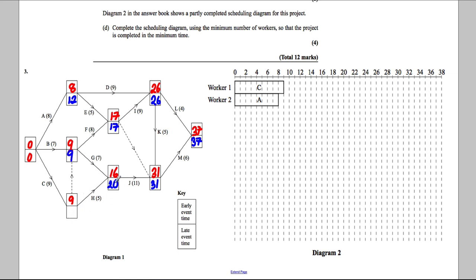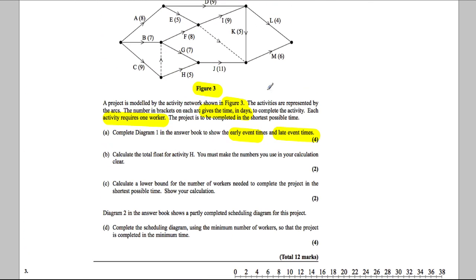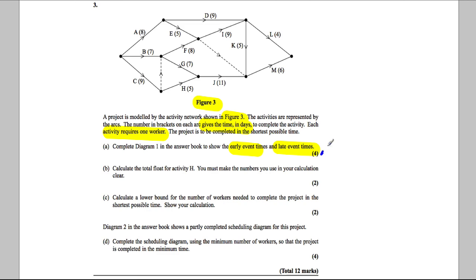For the remaining node: 20 − 5 = 15, or following the arrow direction, 9 − 0 = 9, so we write 9. That completes the forward and backward pass, and we've calculated all the early and late event times.